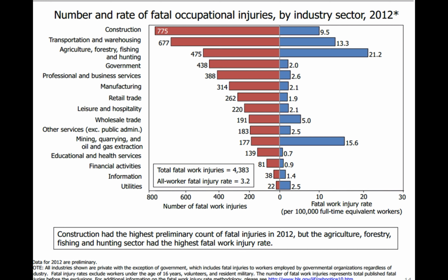One of the problems we have in construction, like we talked about phasing of a project, is that every piece of the project has a different trade associated with it. You don't have the same crew doing the excavation for the foundations as you do pouring the concrete, erecting the steel, putting up your panels, or installing windows, tiles, gutter. It's a different crew that basically comes in every few days to pick up their end of things. Electricians, plumbers, mechanicals, there's tin knockers, you name it.